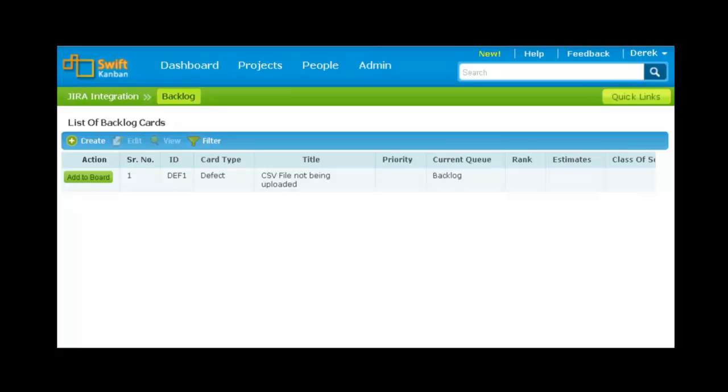As and when synchronization is triggered as scheduled, the issues from Jira are pushed into SwiftKanban. You can see that the defect that we created in Jira is now listed in the backlog of our SwiftKanban project. I can pull the card from the backlog onto the board for execution.